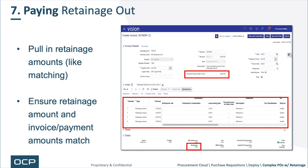At the end of the project, you'll create an invoice, but it's not a standard invoice type — it's probably part of a closeout process. Once you've gotten past punch lists or litigation, you're ready to release the retainage amount. You pull in the retainage amounts, similar to matching — it's a little wonky when you have multiple lines. You have to make sure that the retainage amount on the bottom is zero, meaning you've pulled all retainage amounts into this invoice to be payable. It's all or nothing — there is no ability to partially pay out retainage.